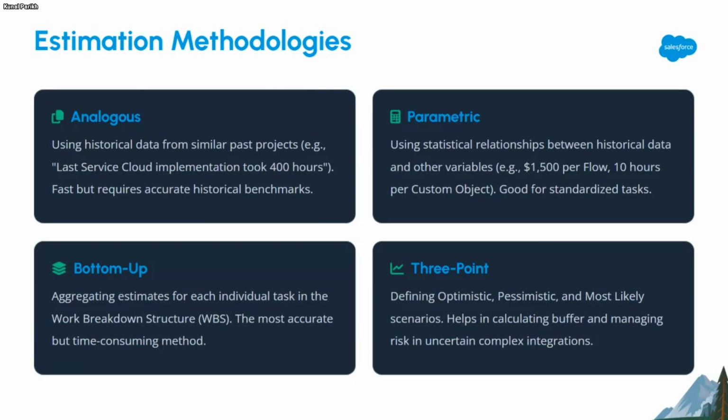So say, for example, the CRM user setup or the Service Cloud user setup took X hours, and this was the cost that we had given. The flow setup took Y hours. This was the cost that we had given. The dialer integration took Z hours, and this was the cost that was there. So you use each part of it to derive a costing for your particular prospect or for your particular project.